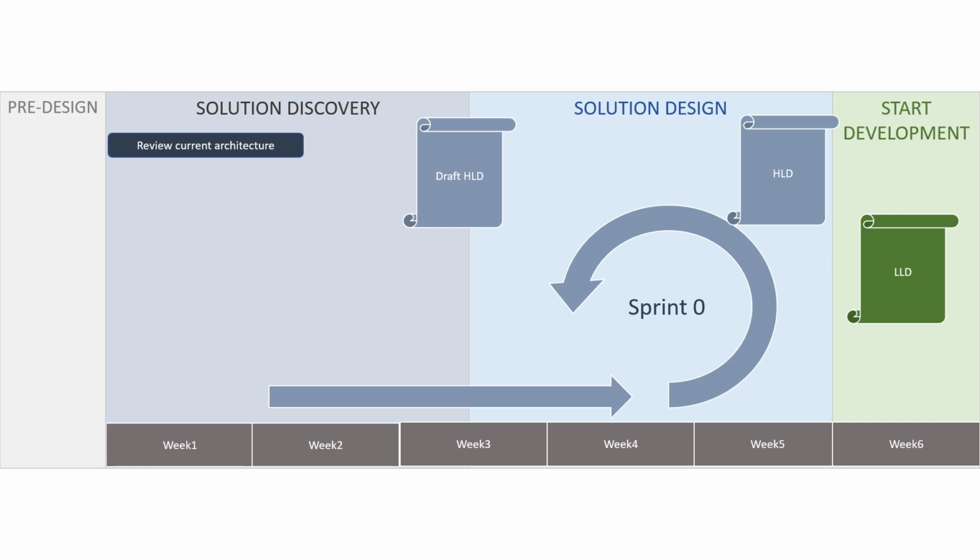Typically, many projects have a sprint zero, and solution architects can utilize sprint zero to have first-hand interaction and discussion with the development team. If it's not there, then the solution architect plans something like sprint zero to set up the architecture framework, third-party libraries, environment, CI/CD process, agree on cadence with the team, and create a weekly design discussion or status meeting with the development team for subsequent weeks.